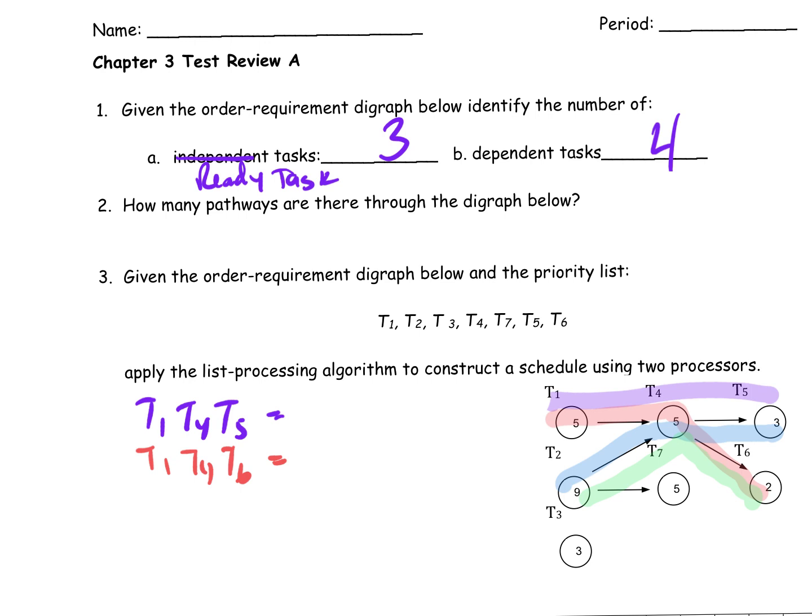I might as well add them up because I've got to figure out a critical path. So 5 plus 5 plus 3 is 13. The next one I have here is Task 1, Task 4, Task 6. That's 5 plus 5 plus 2, which is 12.